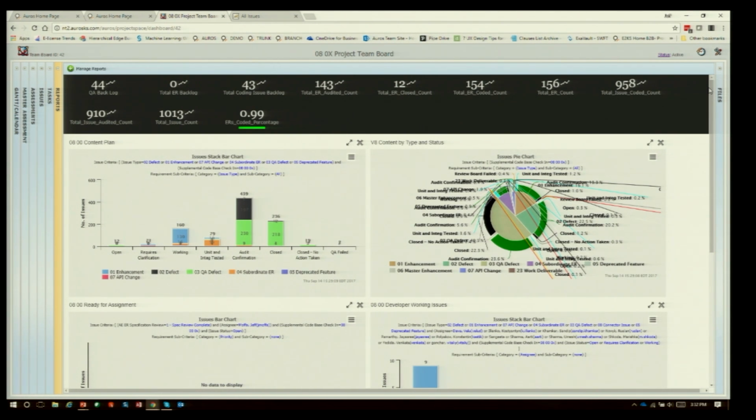How much percentage are red? You create a KPI and just track it. Right? And you can do nice slicing and dicing and create custom rules and create your own KPI. You can create a KPI called risk, and you can use all the different measurements, combine them, average them, max them, minimum, and give yourself a custom risk score. And you can even change its threshold bar based on what phase of engineering you're in.